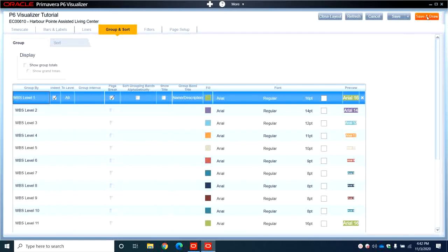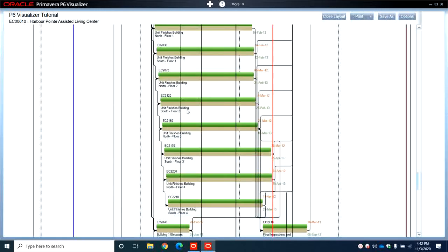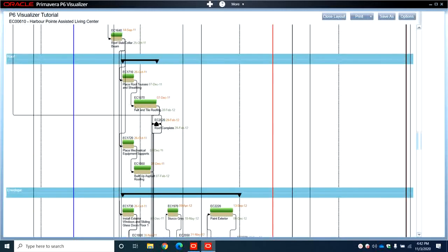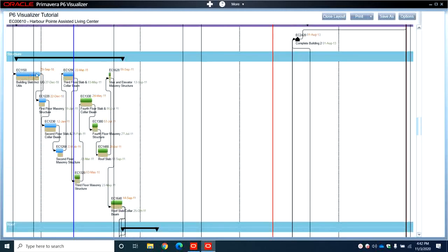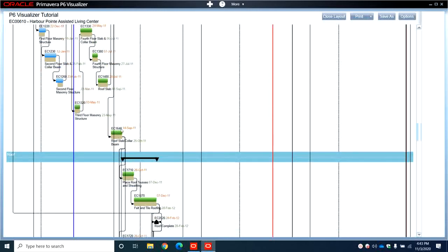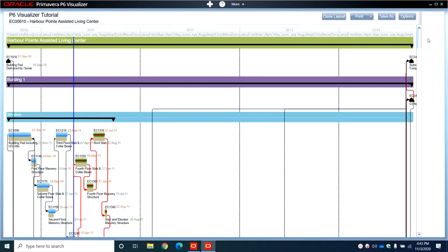So as we can see, also when we added we can see the baseline under each activity or each bar. So this one, for example, it's a blue color, it means already done, and it's almost as the baseline. The green color, it means remaining work, and this one, it's critical remaining work and the critical lines. So this is organized by WBS, building 1, structure 1.